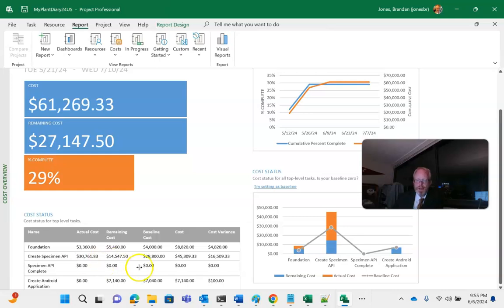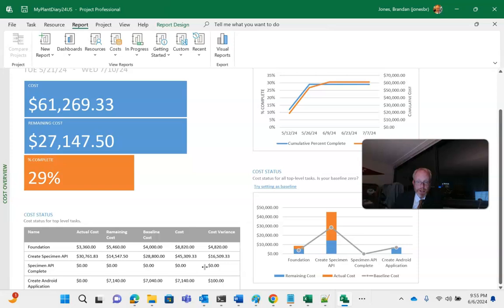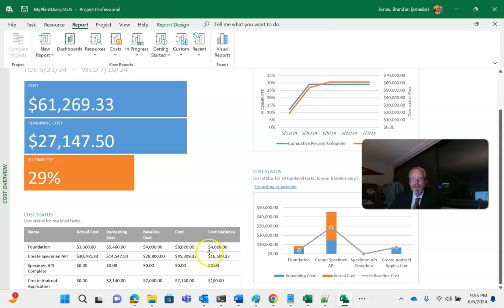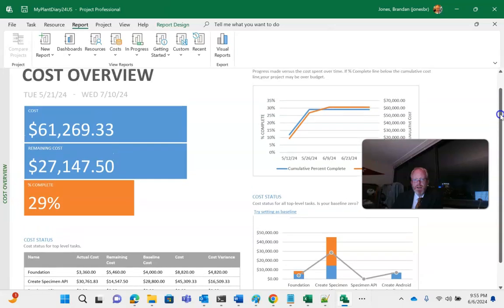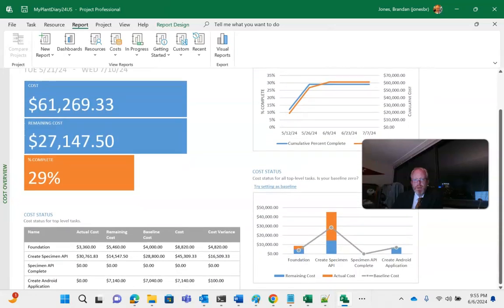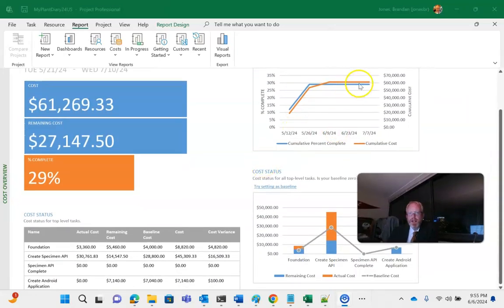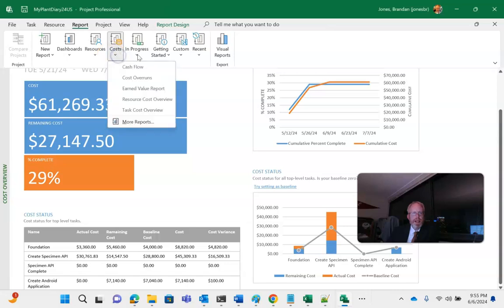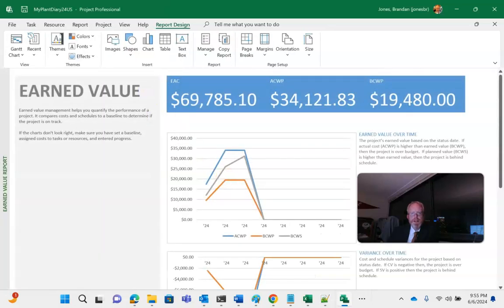You see, create specimen API, that's where I added $10,000 of fixed cost, and I increased the time it would take to complete a task, which would increase its cost as well, because it's that time to completion, multiplied by the resources on that task and their rate. And we see a significant cost variance, not unexpected here. Then up above, we have cumulative percent complete and cumulative cost. And we can see that we're running a little bit high on cost there.